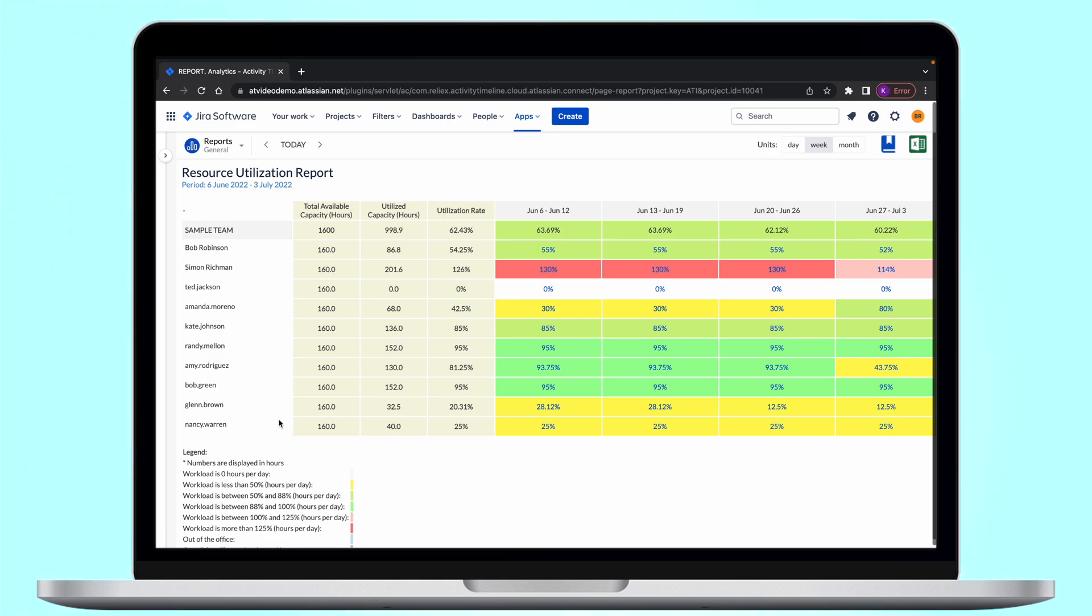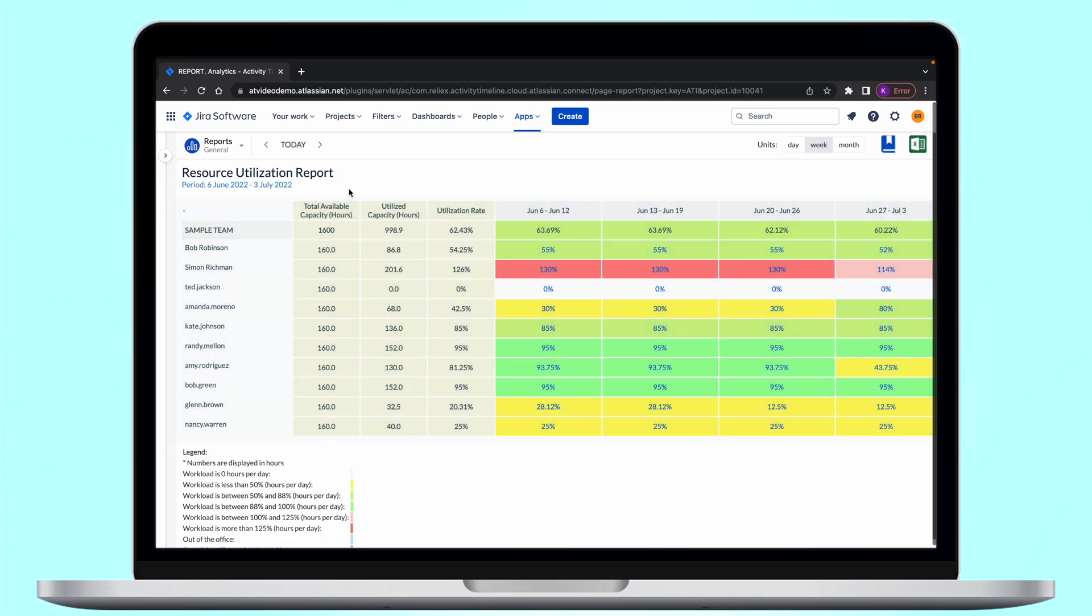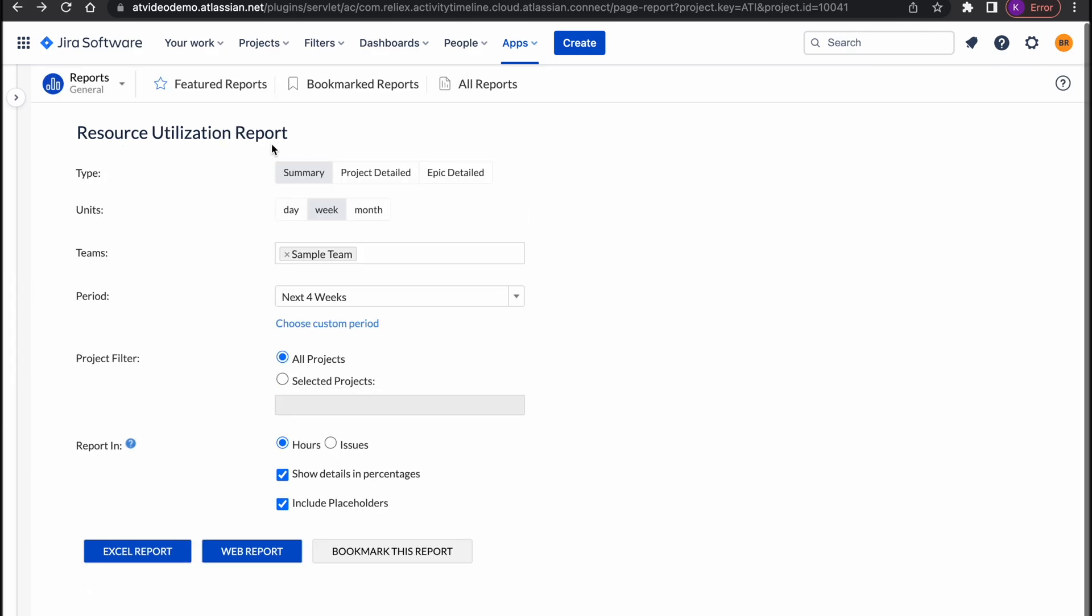A summary report shows how your users are utilized across all of their projects. This report shows what is the total available capacity of the users and teams in the period, how much of that capacity is currently utilized, and what is the rate of the utilization. The data shown here is taken from the time estimated of the tasks assigned to users on their timeline. By default the report is generated in percentage but also available in hours, days, or even weeks.